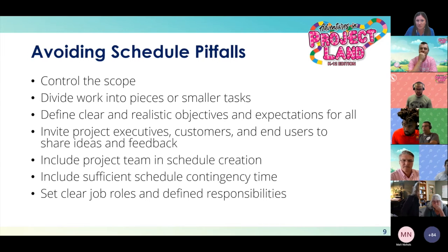A tool that can be used for this is work breakdown structure. This encompasses all aspects of the project, including the person or the team responsible for the component, and breaks down the project into smaller components, making it less overwhelming. Define clear and realistic objectives and expectations for all.